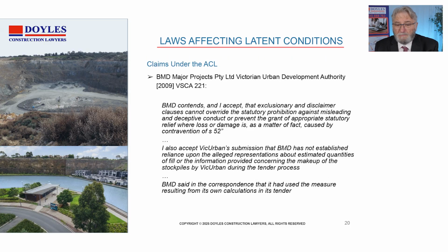So the other aspect is that it's demonstrated the need for reliance. So that means when you're doing your tenders and you're putting in a tender for 100 houses to be built for the government, you must record your reliance on the information provided.